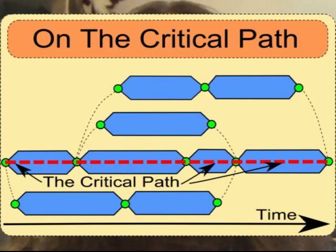The Critical Path Method is based around construction of a scheduling diagram and the identification of the critical path. It then usually attempts to shorten that path by various techniques. Once identified, the critical path becomes the focus of the project manager's attention. Obstacles on the critical path are seen as undesirable and are sometimes known as log jams. Tasks not on the critical path are not so time-critical — delays there have little effect, unless so extreme that they result in the task shifting onto the critical path.